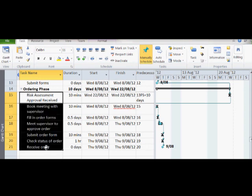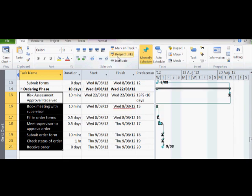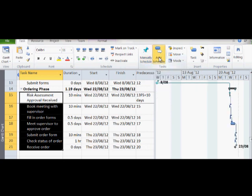The first option is to select all the tasks and click on the respective links icon. The other option is to move from manually scheduling the tasks to auto-schedule. Note in the video, I click on respect the links, and then I undo the change, and then go to auto-schedule. You will notice that they both have the same effect.